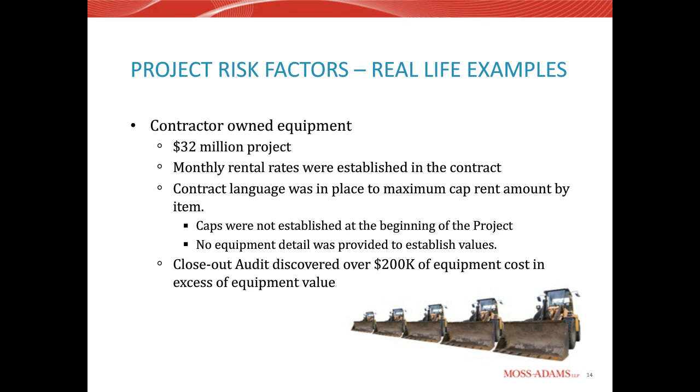So there are a couple things that should be identified. There should be a rental rate in the contract on a monthly basis. It should be in the contract language, and should include what's covered in that rental rate. Is it just for the piece of equipment? Does it also include maintenance? Very rarely, but occasionally with cranes and different lifting apparatuses, it'll include operator time, potentially oiler time as well. But most likely, items like pickup trucks, laptop computers, skid steers, and bobcats usually include maintenance, but they don't usually include operator time. Those are things that should be well established in the contract.